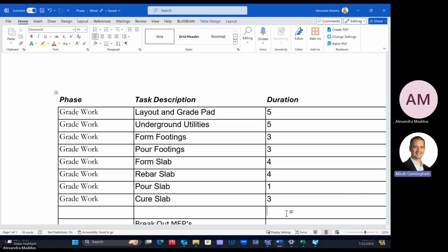Normally, when I move the logic, it'll move up. Yeah, because you have yours sorted by something, probably sorted by start. So you could do that, tie it in, and then renumber from there, whatever's easier. It's also easier if you put them under a heading, then you can collapse the heading and move that. Like if you collapsed grade work, say you made a heading for grade work, then you can cut and paste that whole heading and it'll paste the whole thing up there.